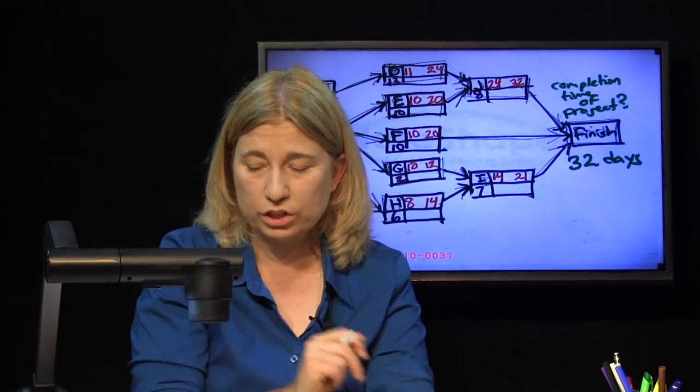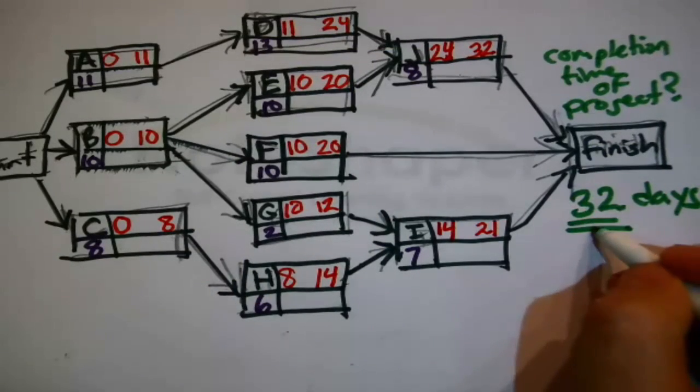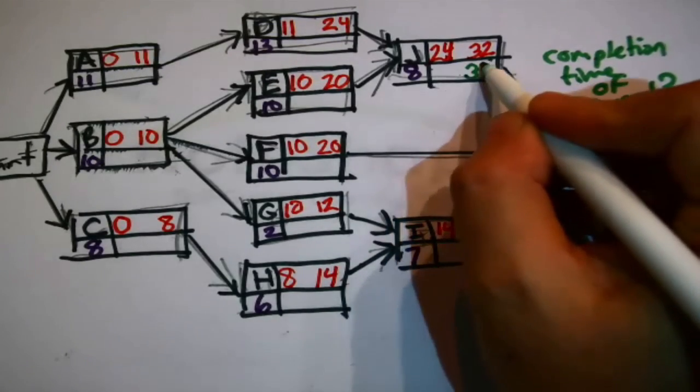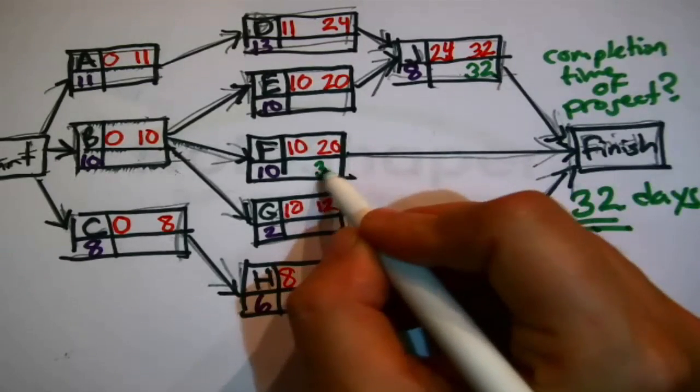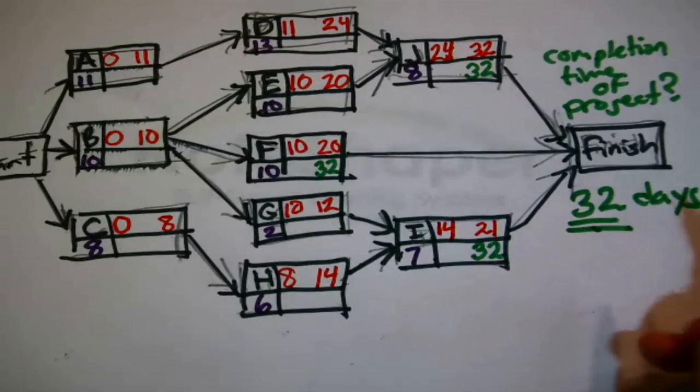This is going to obligate us to finish the analysis. All right, late start, late finish times. We begin with this fact. We could finish in 32 days. We're going to finish in 32 days. 32 days is our deadline. That means anybody connected to the end must be finished at the latest in 32 days.